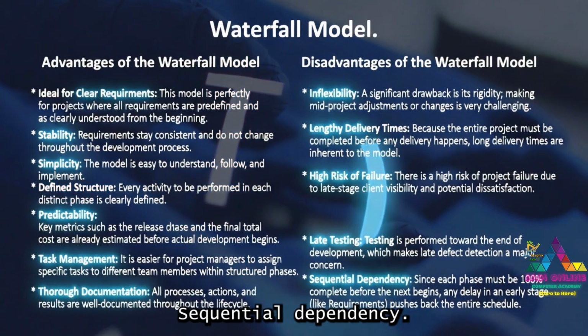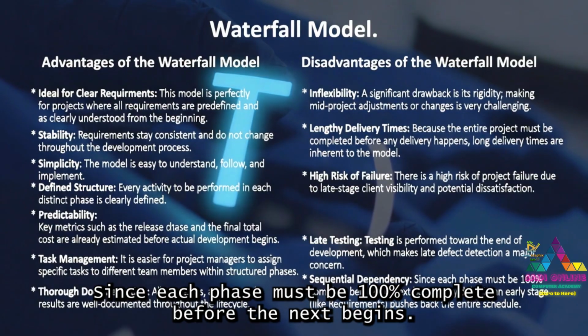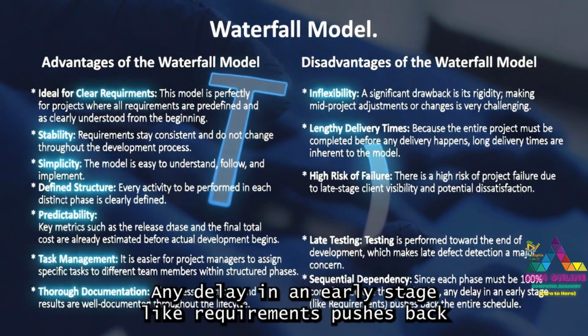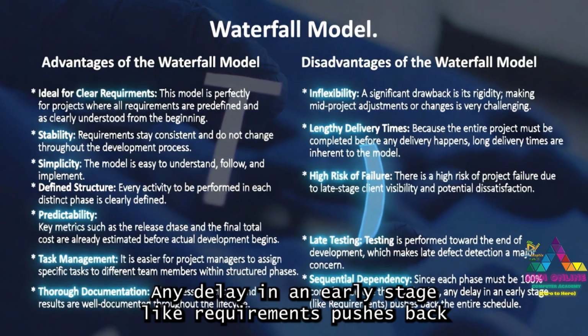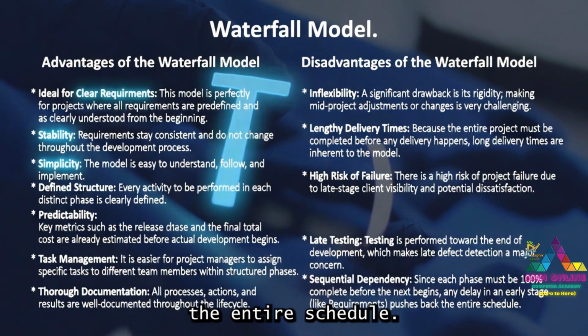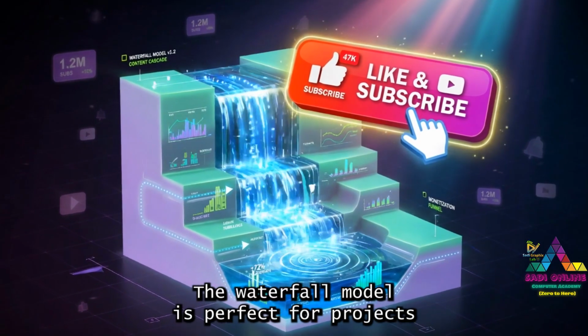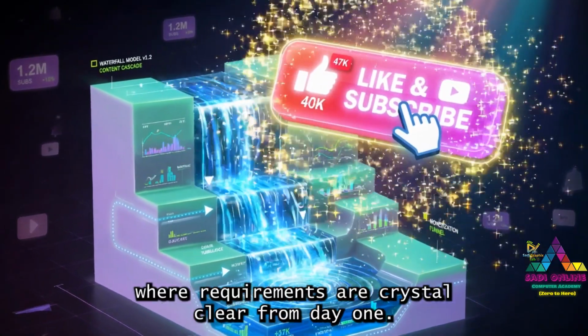Sequential dependency: since each phase must be 100% complete before the next begins, any delay in an early stage, like requirements, pushes back the entire schedule. The waterfall model is perfect for projects where requirements are crystal clear from day one.